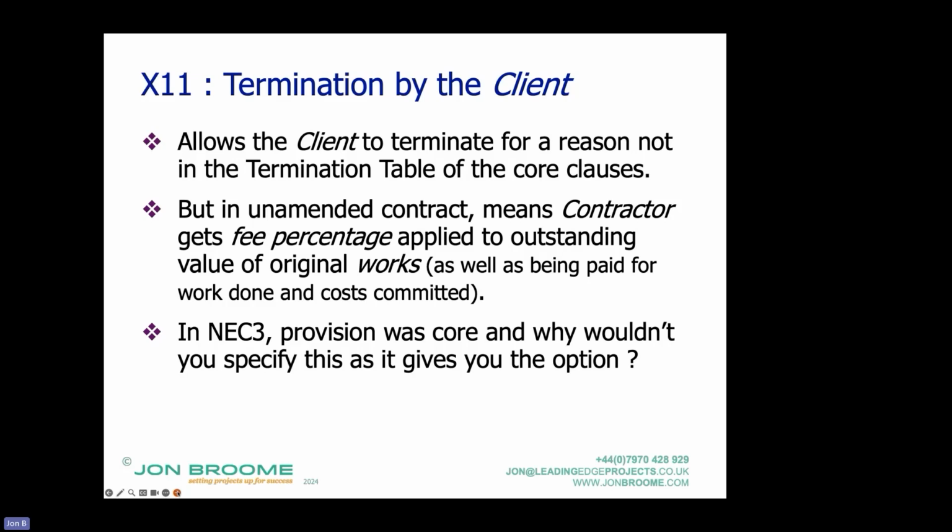So NEC, when it came out, was fairly unique in that it had termination provisions where the contract could be brought to an end early through the mechanisms of the contract. So rather than repudiate the contract and have a big argument under contract law about who was at fault and how much, it defined the reasons, and depending upon the reasons, defined the process and the amount the contractor got paid.